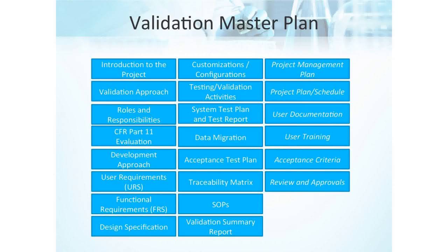Yeah, that's true. And that actually feeds into the review of the acceptance criteria. Understanding the acceptance criteria then should feed your communication plan, how you communicate. It's all tied together. And notice that the project manager is very often left off the reviewers and approvers, by design. Often the IT project manager is referred to as a journeyman of sorts. They go from one project to another, could go from one company to another, and they don't necessarily own the systems. They own the project, but not the system that they're actually delivering. For that reason, it really doesn't make sense to have them as an approver on the documentation.